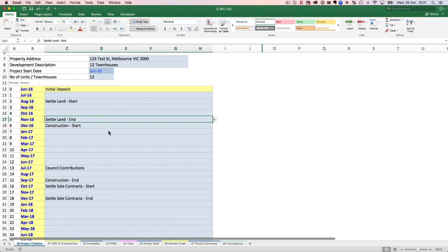In Victoria, we apply for compliance with South East Water, in our case, or Yarra Valley Water, or some other water authority. You have to have a Plumbing Industry Commission number that gives you the green light on starting the plumbing works. That could cost anywhere between $15,000 to $18,000 and so on.